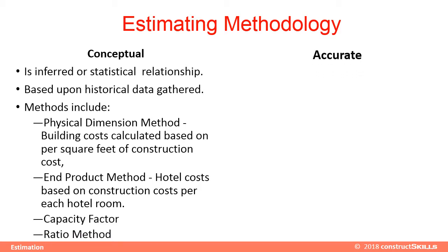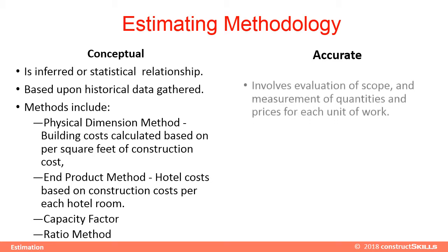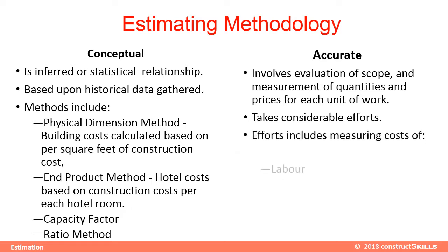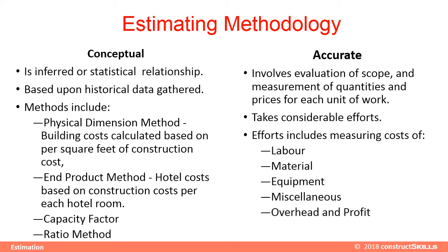Accurate, deterministic estimating involves evaluation of scope and measurement of quantities and prices for each unit of work. It takes considerable effort. Various efforts are required for measuring costs of labor, material, equipment, miscellaneous, overhead, profit, risk, and contingency.